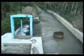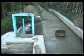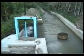The outcome of the study was a plan for a 12 kilowatt scheme harnessing approximately 50% of the hydraulic potential of a naturally descending irrigation channel running through the village. On the basis of this study, the plant, with a flow of 150 litres per second and exploiting a drop in elevation of 14 metres, was constructed and completed in 1994.